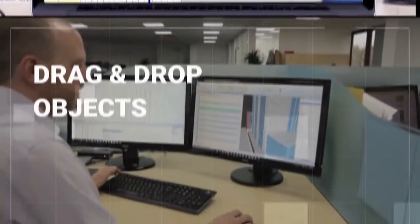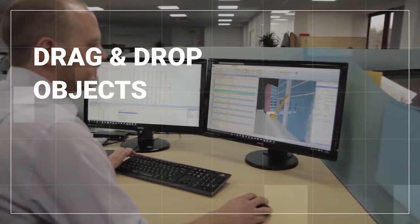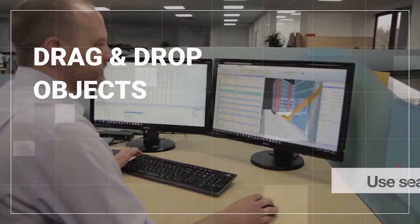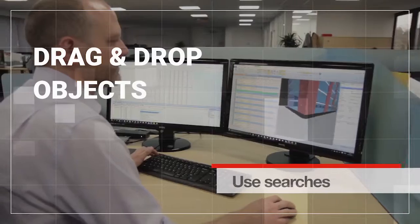You can just drag and drop objects between the 3D view and tasks, or use searches to find groups of similar items.